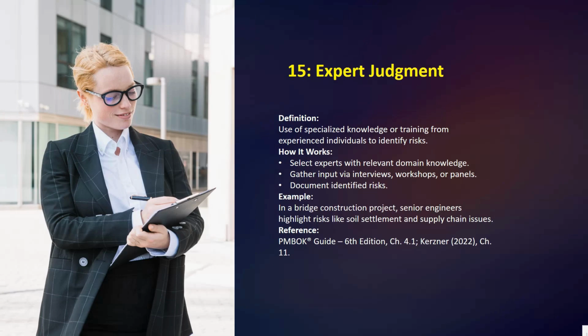Next, let's see the definition here. Use of the specialized knowledge or training from experienced individuals to identify risk. How it works: select the experts with the relevant domain knowledge, then gather input via interviews, workshops, or panels, then document identified risk. First, you select the experts with relevant domain knowledge and gather their inputs. This can be done through interviews, workshops, or informal conversations.